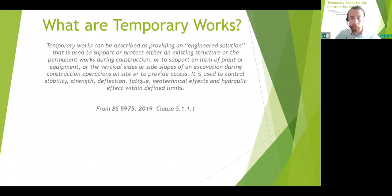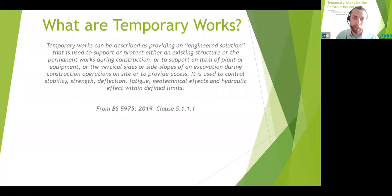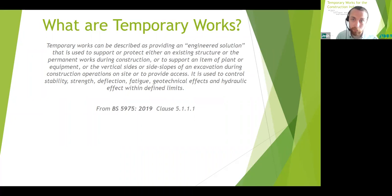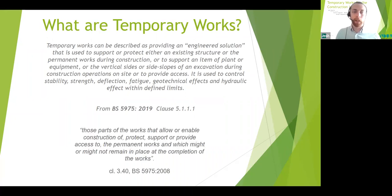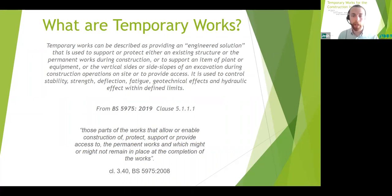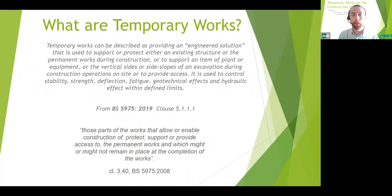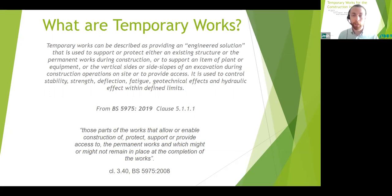The best place to start is to define temporary works. The new definition in BS 5975:2019 is quite wordy and does basically encompass everything. It also lists the types of things which should be considered as temporary works in the standard. The previous version defined it as those parts of the works that allow or enable the construction of, protect, or provide access to the permanent works, and which might or might not remain in place at completion. This is a slightly more succinct definition, but it also encompasses a lot. That's because the scope of what temporary works is, is extremely extensive by its nature.